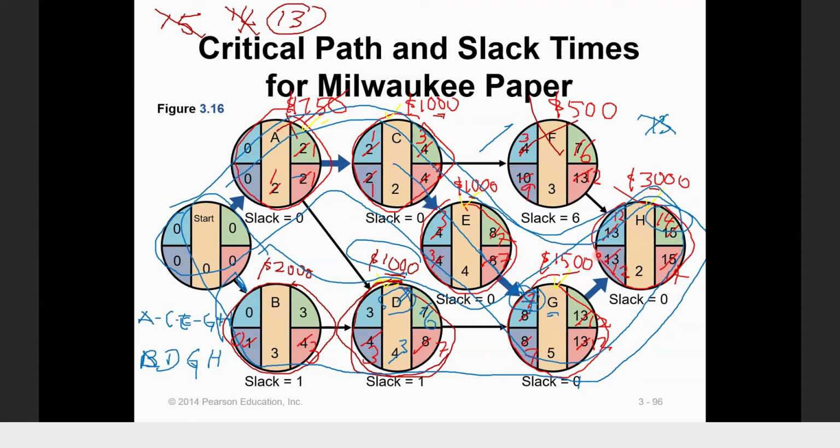You can see it right. Okay, so if you are not convinced, you have to do it one by one again, like I said earlier. So we reduce the junction because both directions come through G. So when G is reduced, the N also reduces. Okay, so it becomes 13. So the new cost for the project will be an additional 1,500.